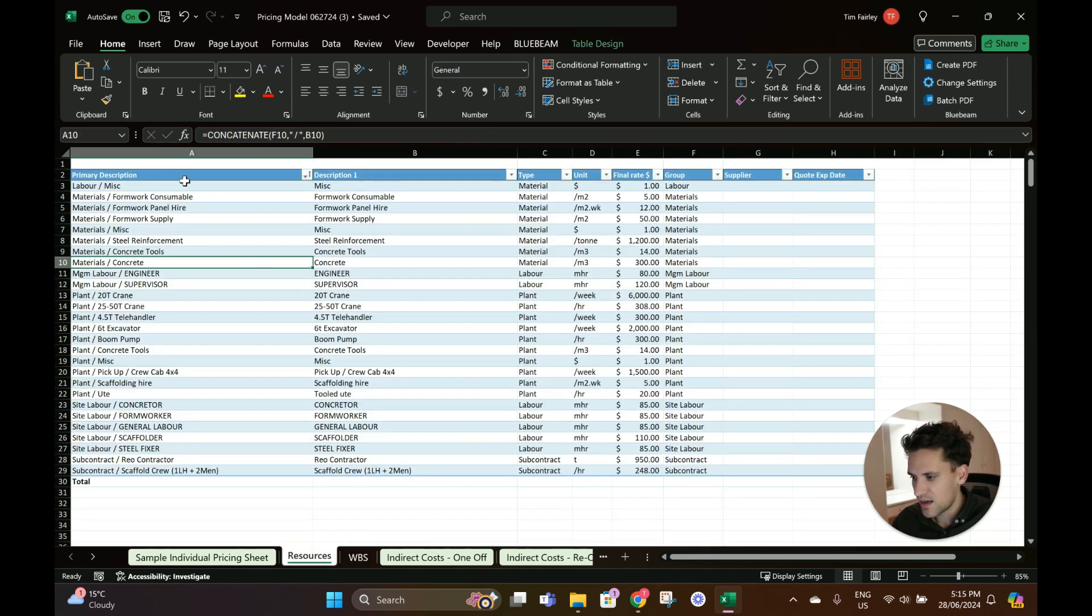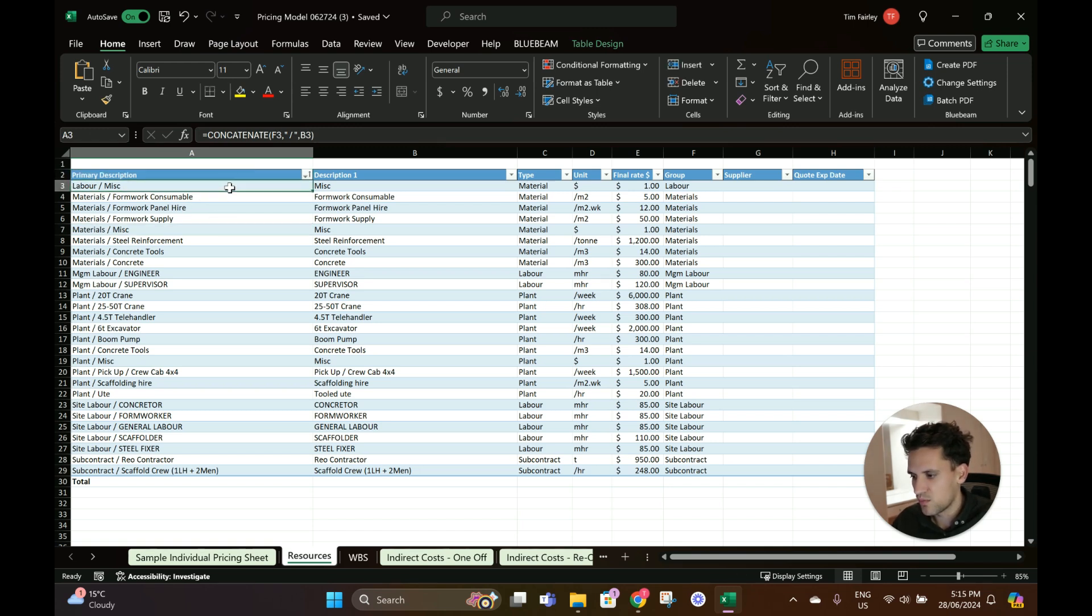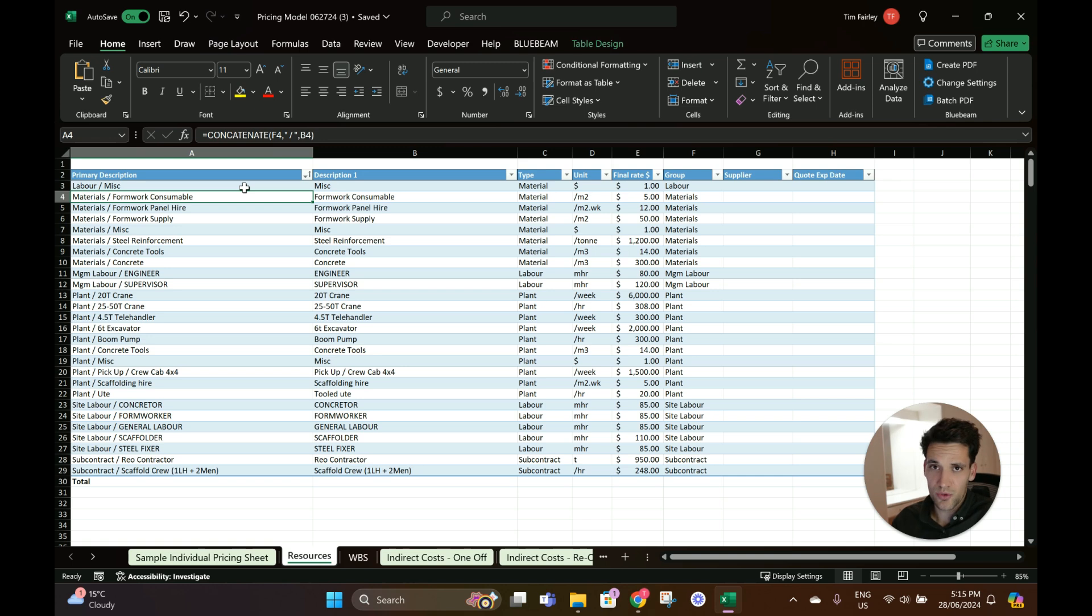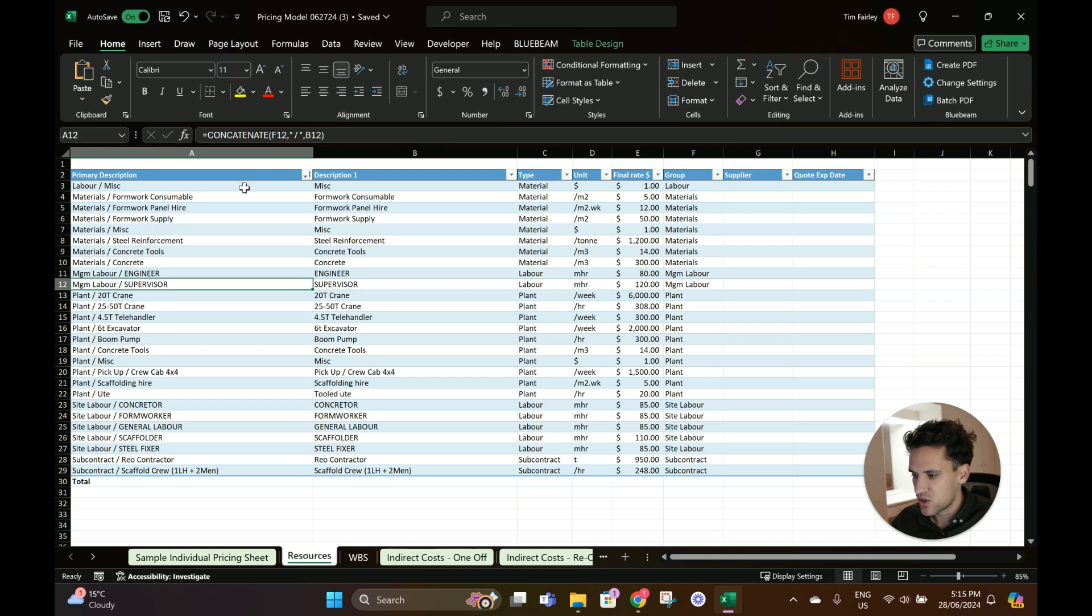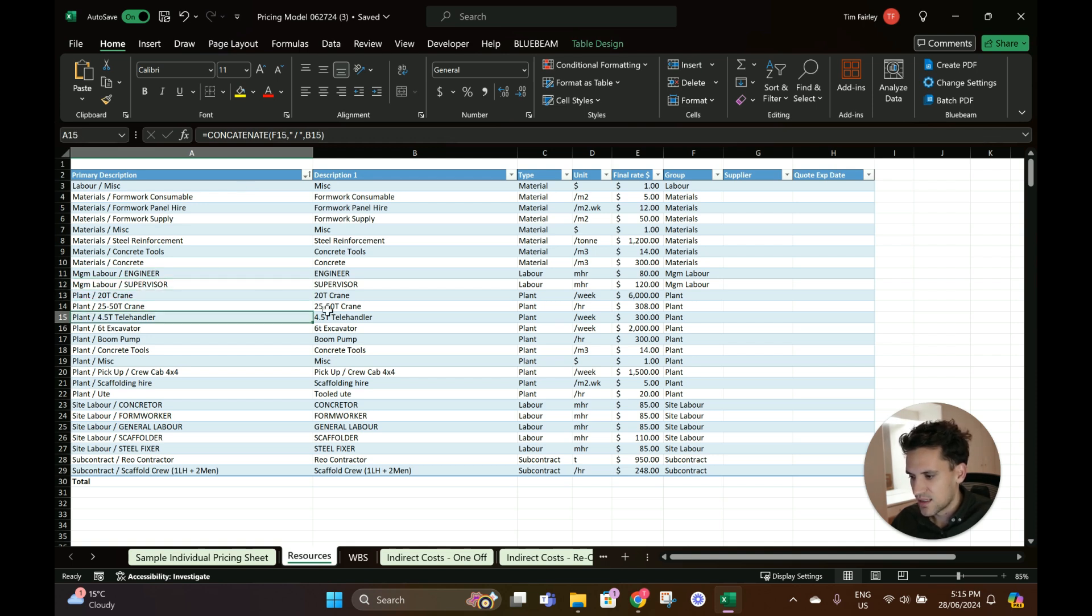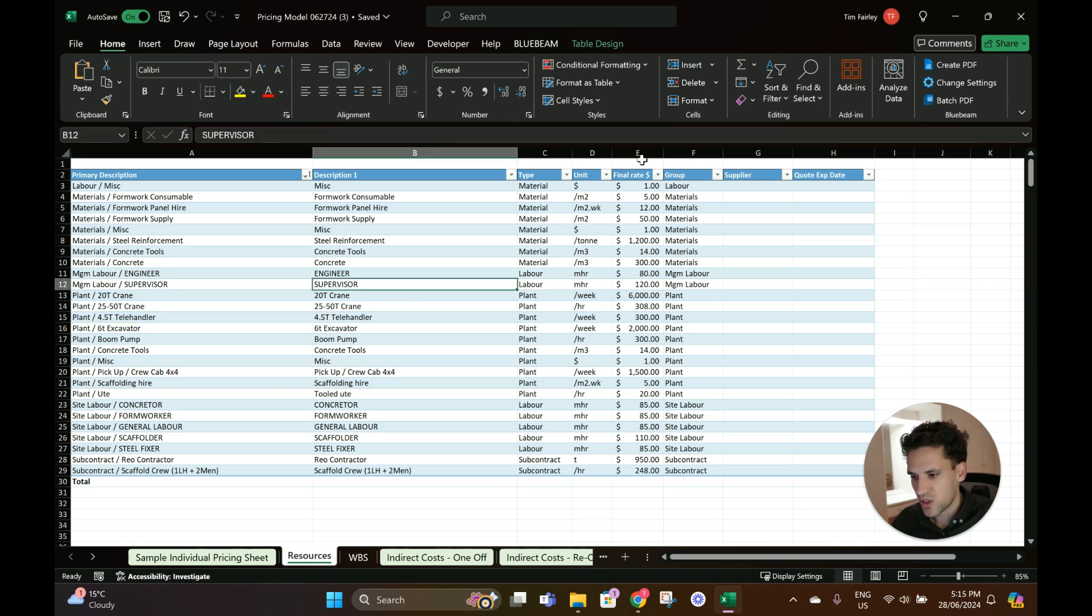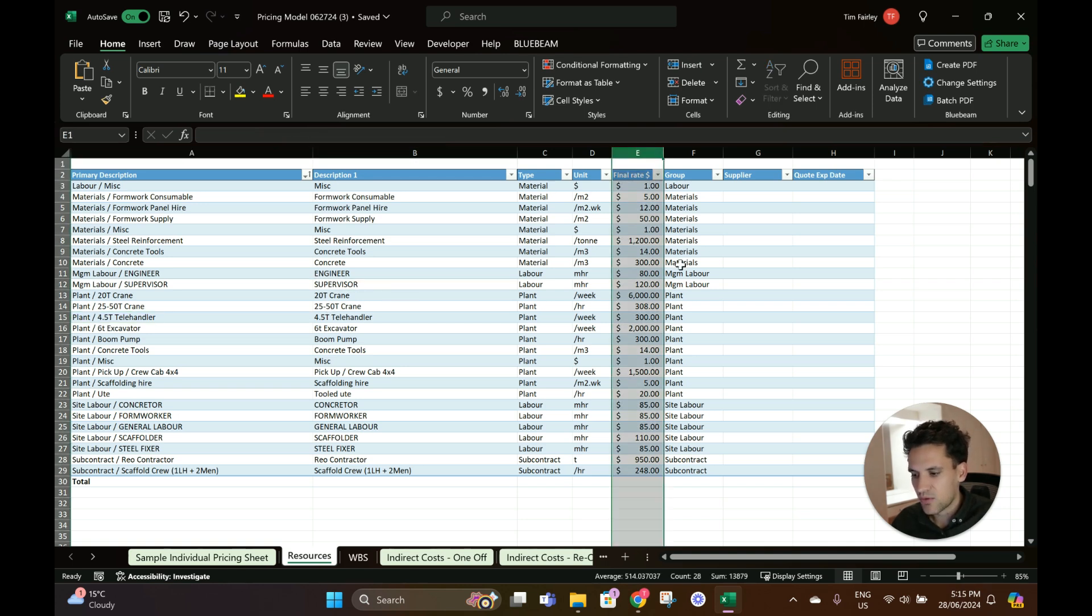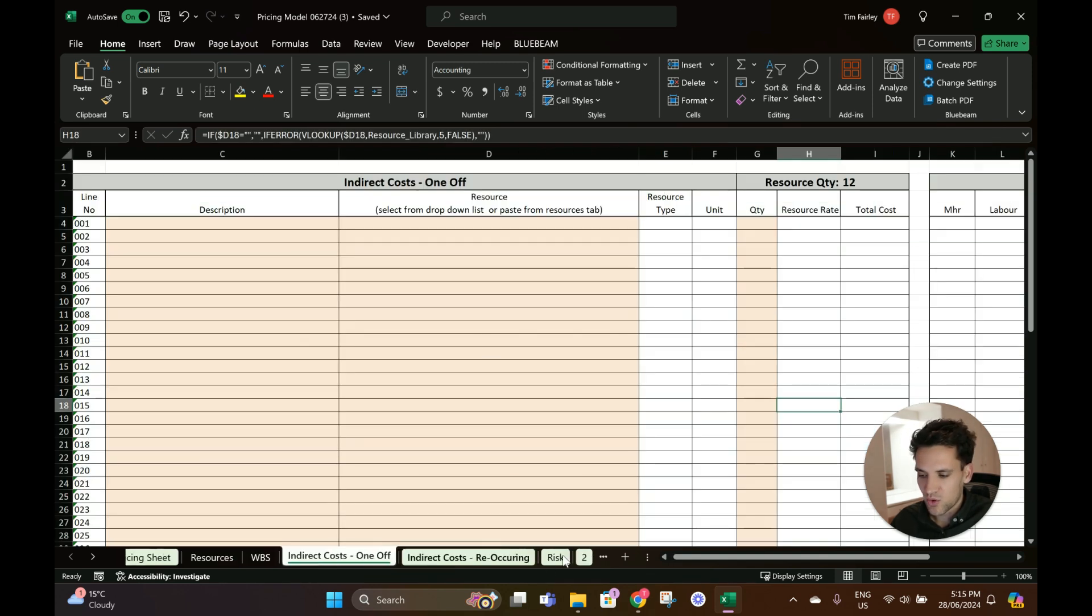On the resources tab you enter in all the different resources you'd use to price a job. This is for a concreting job so we've got formwork, steel reinforcement, concrete, engineering, a supervisor, a crane, telehandler - all the different resources that you'd build up to price your project. We've also got rates and then we've got all our individual pricing sheets.